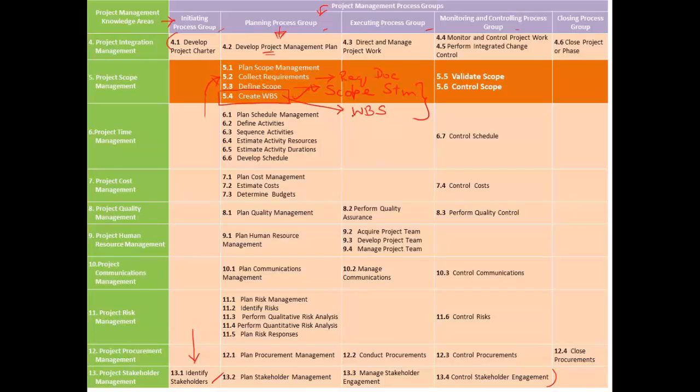Why? Later on, let's say if I want to measure the performance of a particular train, we can simply compare the performance of the train against the schedule to find out if the train is running late or running on time. So the railway timetable can be considered as the baseline, a performance baseline for the trains which are running on that particular track.